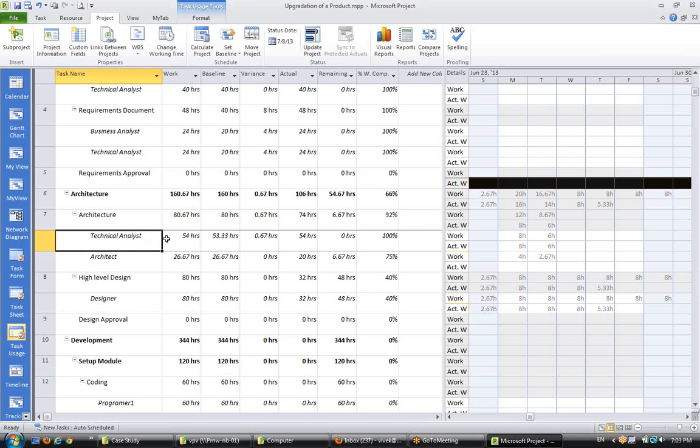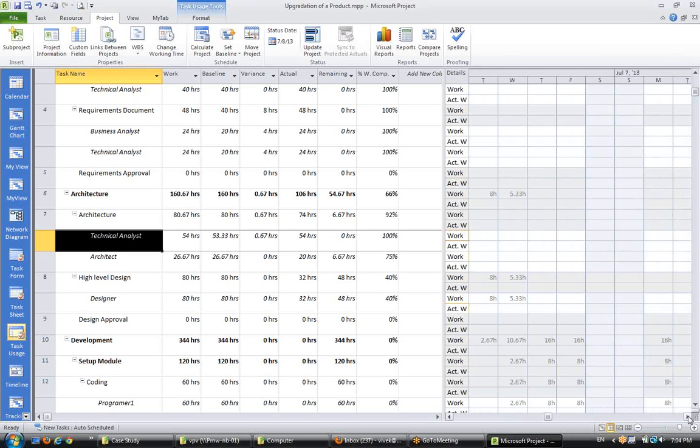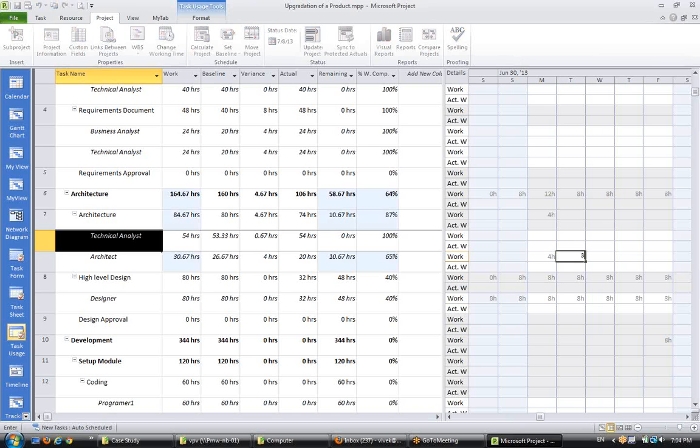And you come over here and update the task. I say he came over here and spent 4 hours on this day and 3 hours on this day in actual work, and this work is over. You see this is 0 now.